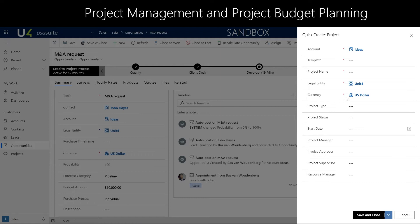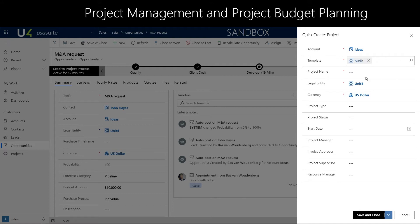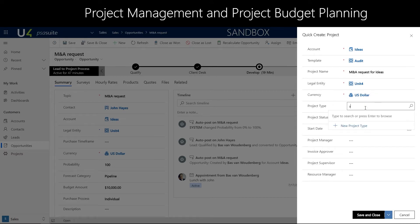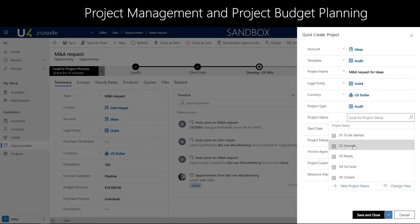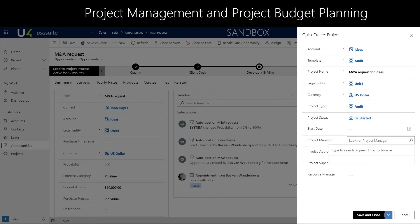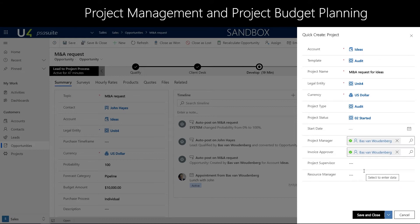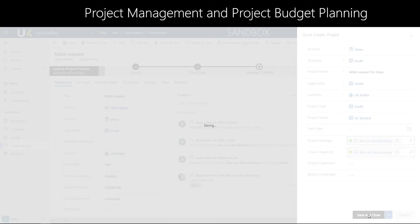Creating a new project will allow us to allocate a template. A template is a work breakdown structure — a work plan that defines your project structure. We can put in a project name and a project type for reporting purposes. A project status can also be applied to your own needs. I will be acting as the project manager and as the invoice approver. Multiple roles can apply on a project across multiple projects. We click on save and close and we have created a project.